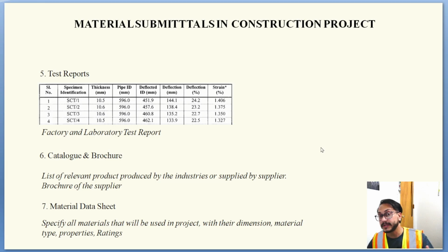For your company you definitely have a brochure, so you will attach the brochures from the manufacturing company, the supplier one. The catalog will be all the accessories your supplier produces. They may produce thousands of accessories. So we need to include in the catalog what they actually manufacture, what are the sizes, the internal diameter, the external diameter, length, breadth, all the details for each of the materials. Okay, number 7 will be material data sets.